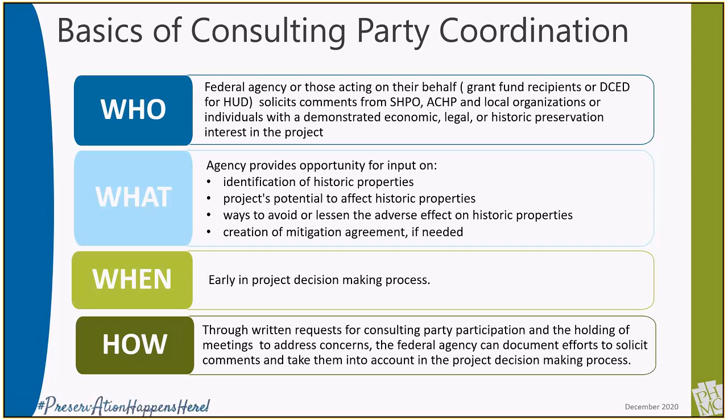The consultation should happen as early in the decision-making process as possible so as not to preclude the consideration of project alternatives offered by consulting parties. Project consultation is most effective and least stressful when undertaken early in the process when more project options are possible.